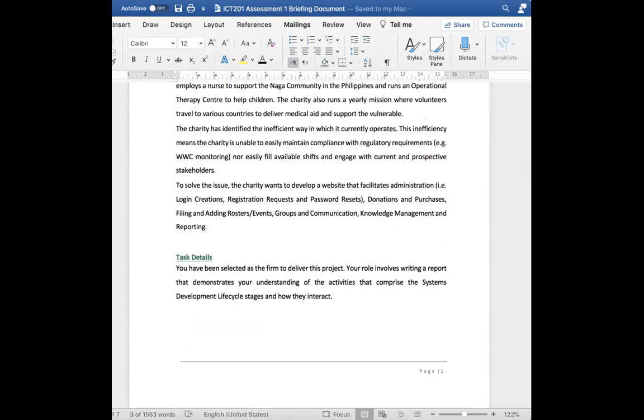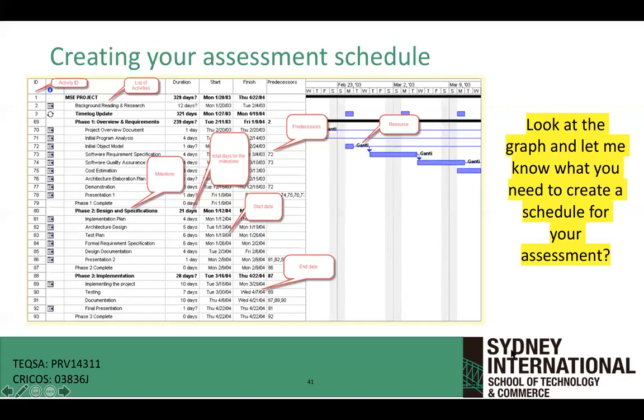The only difference between the schedule and the work breakdown structure is that the work breakdown structure gives you this list, and then the schedule picks up on that list. The schedule puts start time and end time, what comes first and what comes after, and who is going to be doing the job. But this is the foundation. So you create the work breakdown structure, and from it you'll be able to start creating start dates, end dates, tasks, predecessors, Gantt charts, to name a few. Does that make sense?